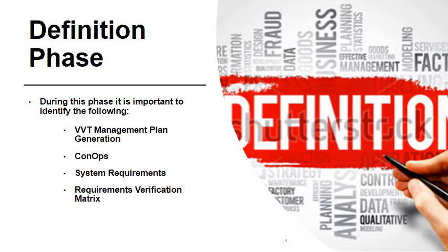our system. After the CONOPS is reviewed, we create the system requirements, which consists of a short list of the entire requirement list. Once the system requirements were peer-reviewed, a final RVM was created. The RVM is needed in the definition phase because it is a verification of the final requirements identified.